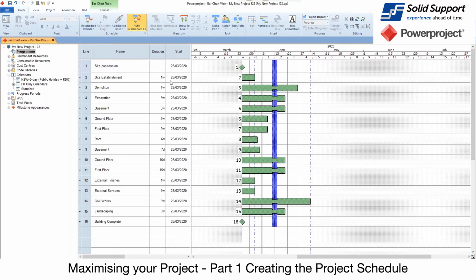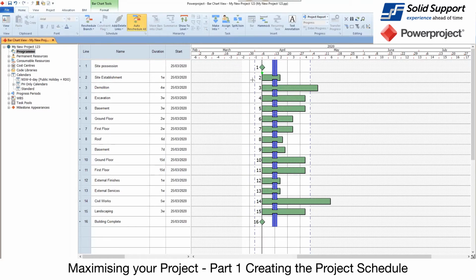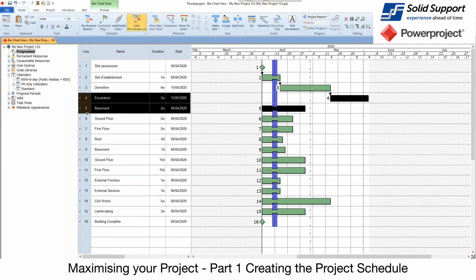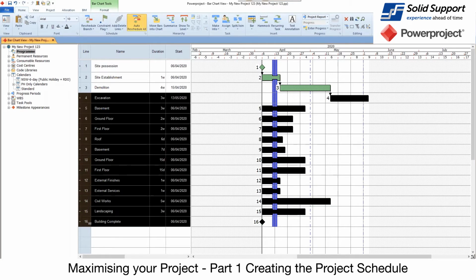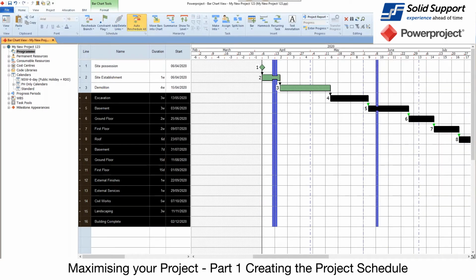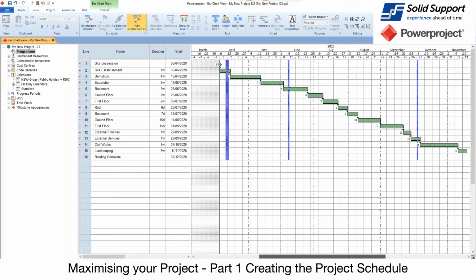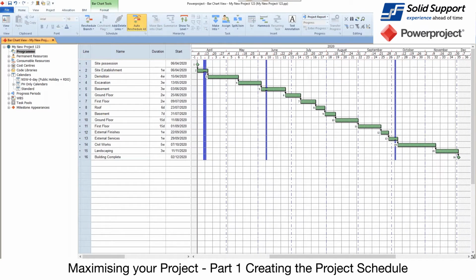Now, if I want to link these together and put a relationship between them, I can literally just draw that relationship. So as I'm going through, I'm saying, that links to that one, that links to that one, and so forth. I might say that I know that all of these, and I'm just going to be very simplistic here, actually link, and link those tasks automatically. So I've just put those in place there. So there are all my activities, and you can see my end date there. Now it's auto rescheduling because I've got that turned on. I can turn that off if I want to.